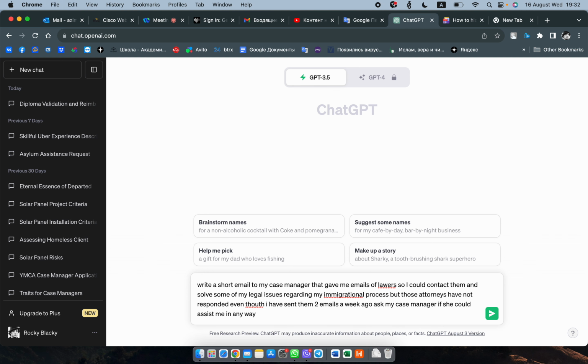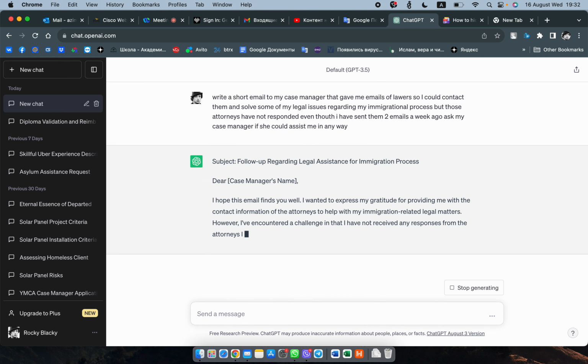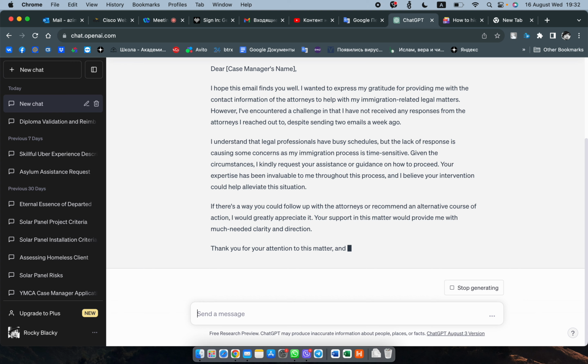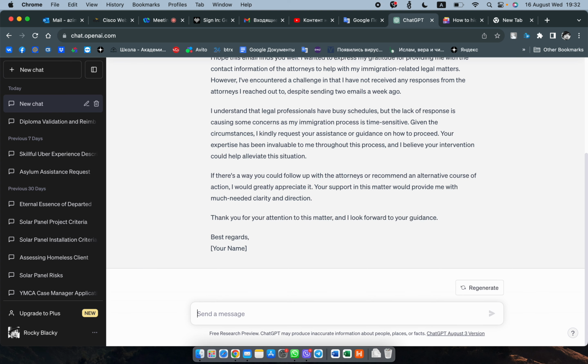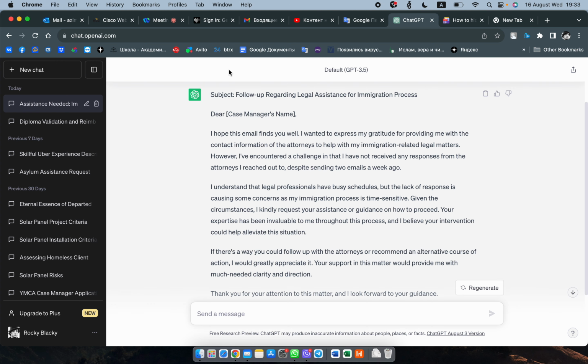Every day he's going to have a 15-minute daily Scrum meeting, a stand-up. He's just going to come into a room where the team members are, the programmers, the coders who are building this website, and ask them 3 questions. What did you do yesterday? What are you going to do today? And do you have any roadblocks?